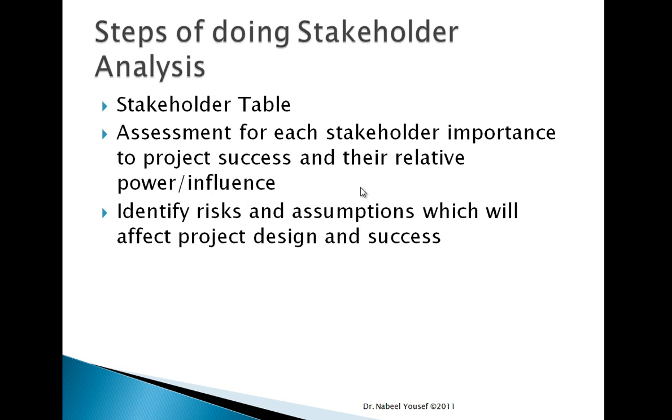The steps of doing stakeholder analysis. First of all, we need to develop a stakeholder table, then assess each stakeholder's importance to project success and their relative power or influence. Then identify risks and assumptions which will affect project design and success.